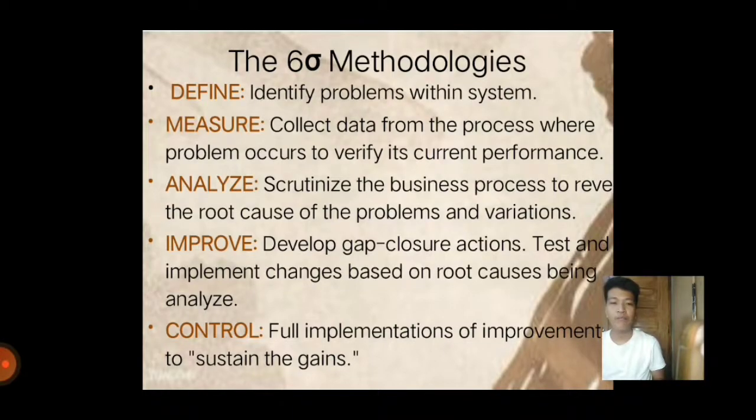For the DMADV, define the project goals and measure critical components of the process and the product capabilities, and analyze data and develop various designs for the process, eventually picking the best one. Then design and test details of the process, and the last is verify the design by running simulations and pilot programs, and then handing over the process to the client.